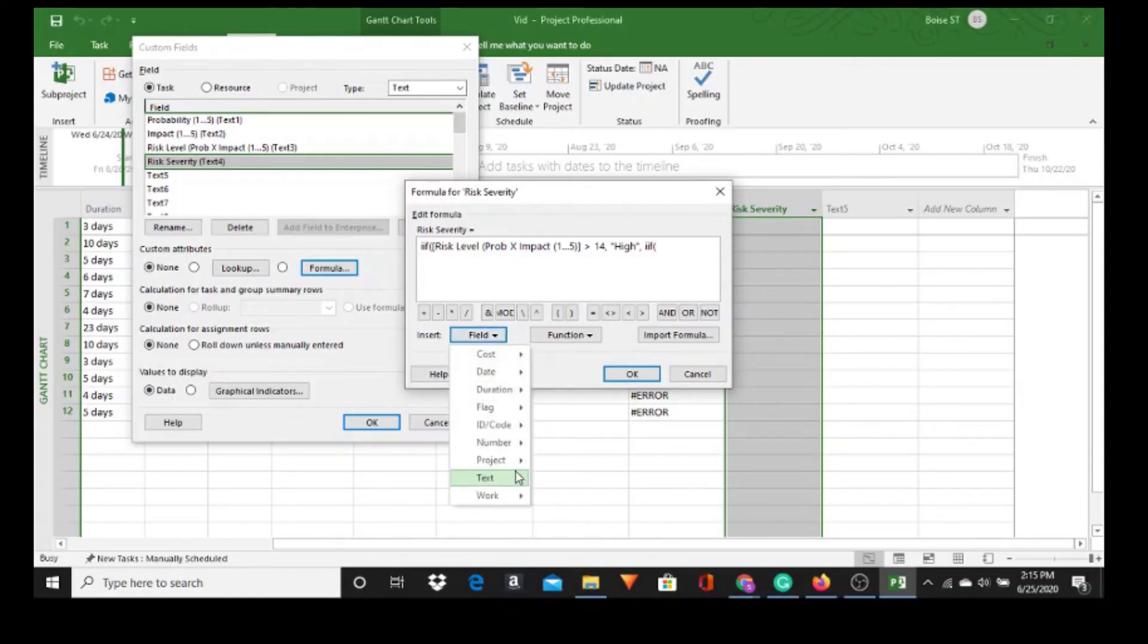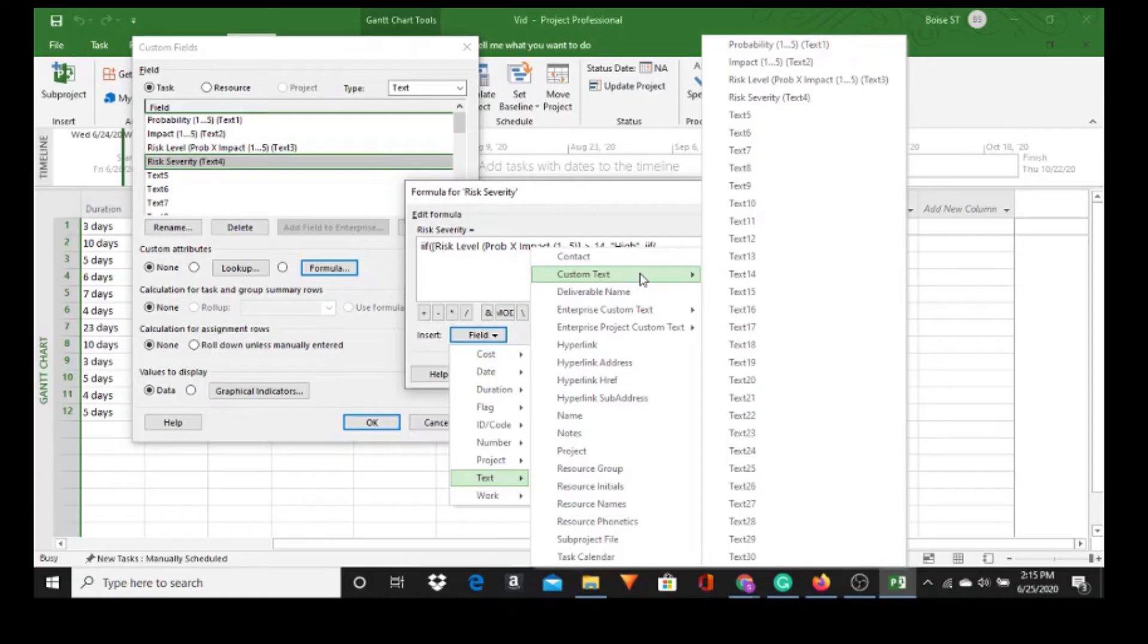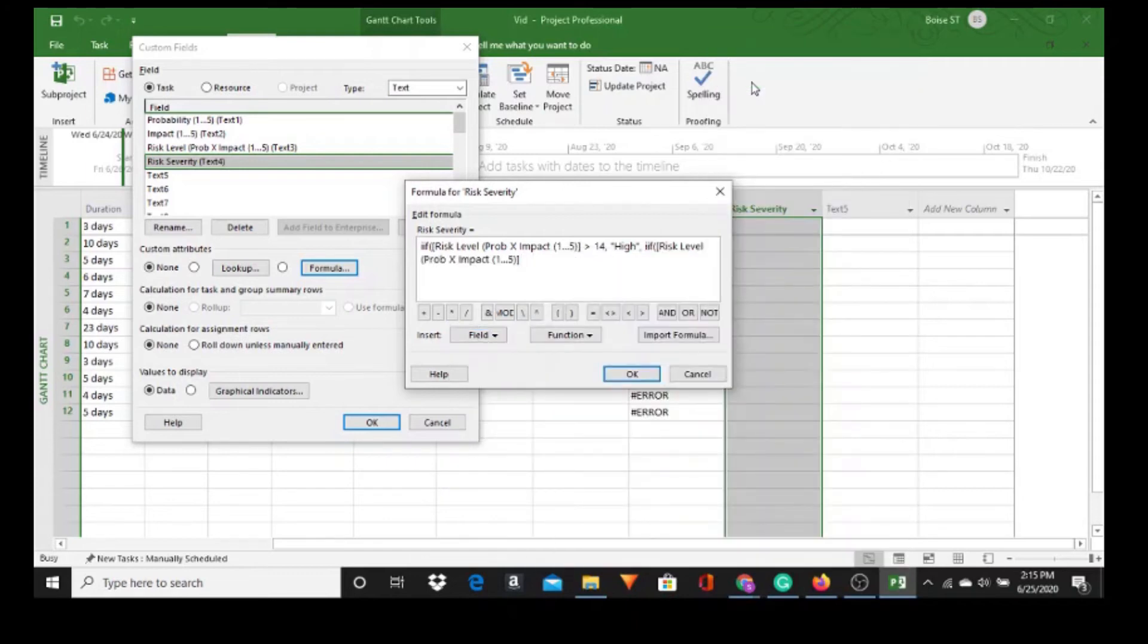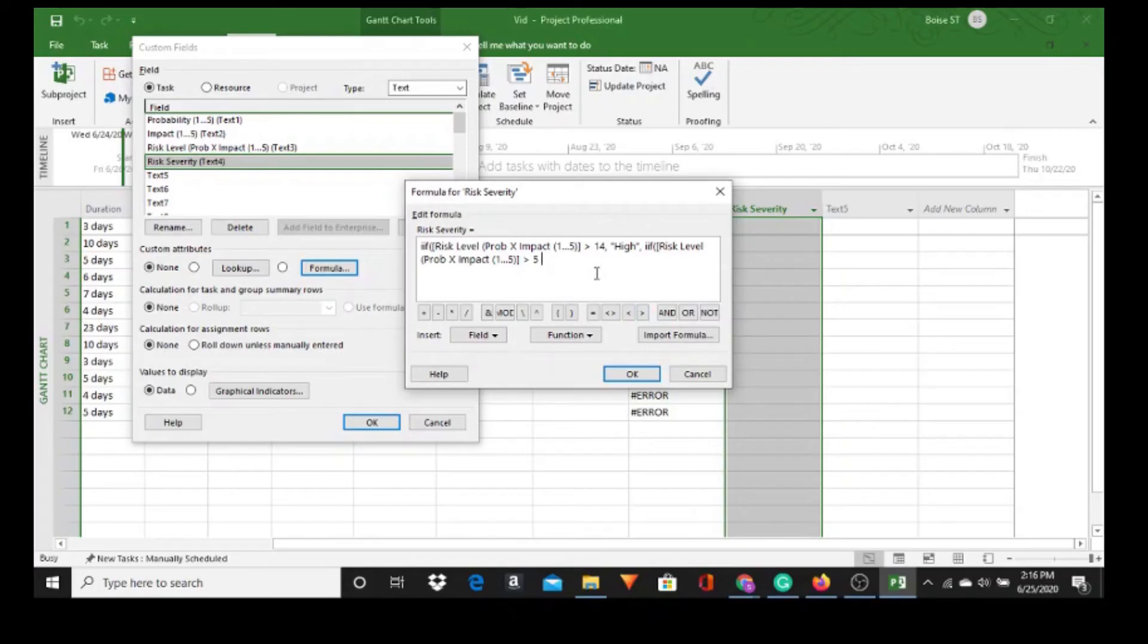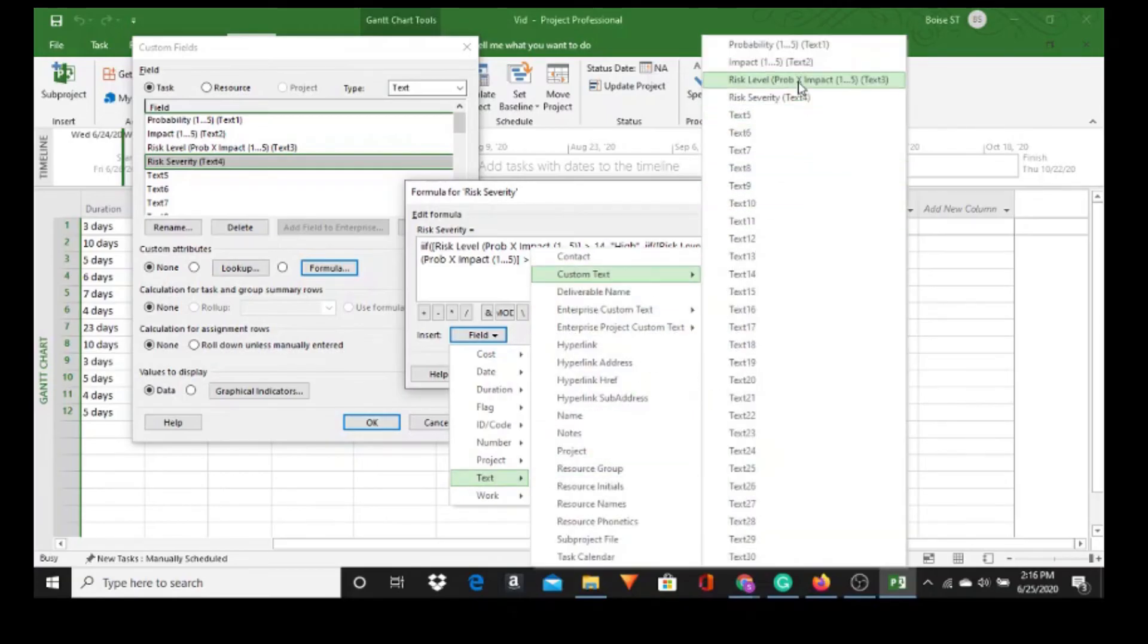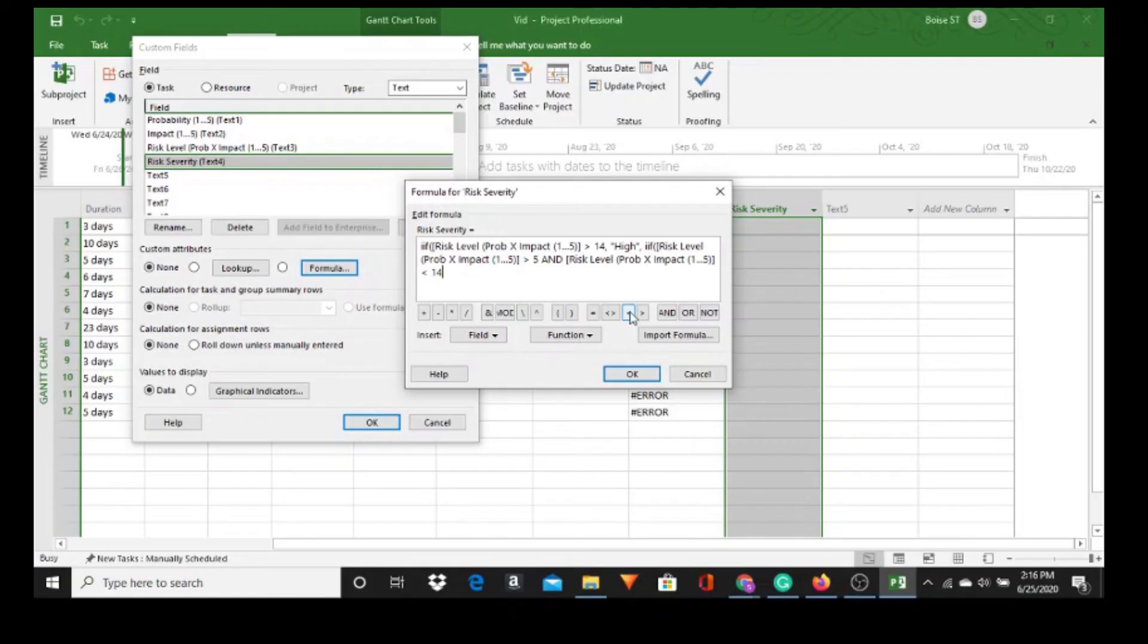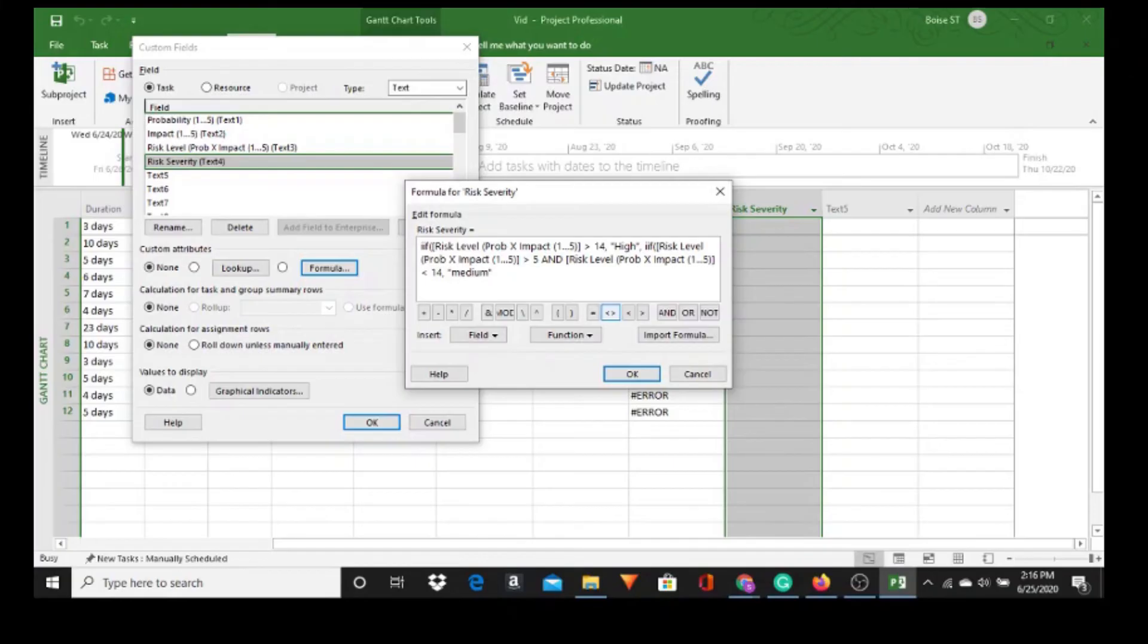IIF open parentheses, Field, Text, Custom Text, and now if the Risk Level Text 3 is greater than 5, space and, the word A-N-D. Now you can type it out or you can do it right here. And Text, Custom Text, and I'm going to use Text 3 again. Less than 14, because we've got greater than 14, now less than 14, comma space. In quotes for this text I'll put a capital M, doesn't really matter though. Comma space and Low.